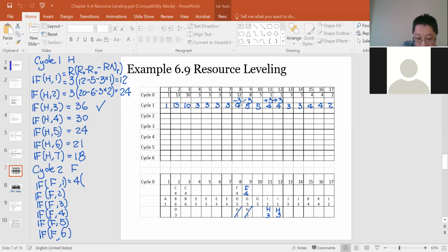vacated that. I'm gonna use my new distribution. Be careful here. I'm gonna use, because when I analyze F, this H already shifted. So I should use my new distribution of this row to do the calculation. So F from 8 on day 8 is 9 right now. Occupied day 10, occupied day 10. Oh, no, vacated day,